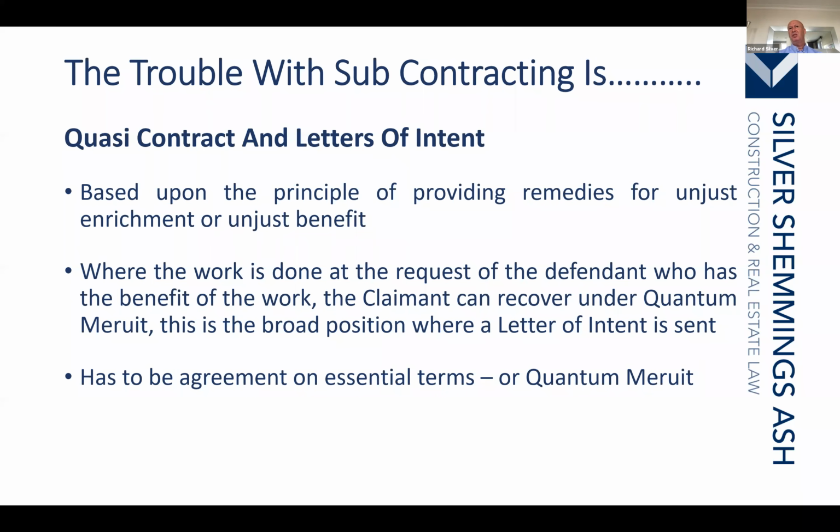It says we've got to issue all these notices if we were delayed. And well, we were delayed at the start for variations, and I can't now do that retrospectively because it will say that I didn't do it as soon as reasonably possible, which the contract provides for. So I don't want to do that. And there's loads of other problems. How are we going to deal with that?